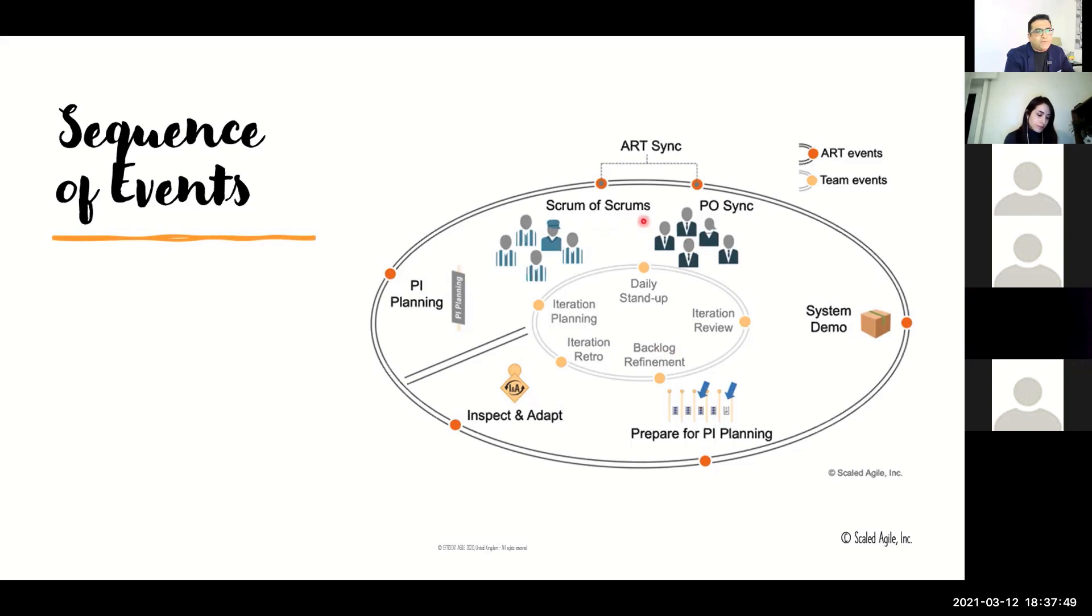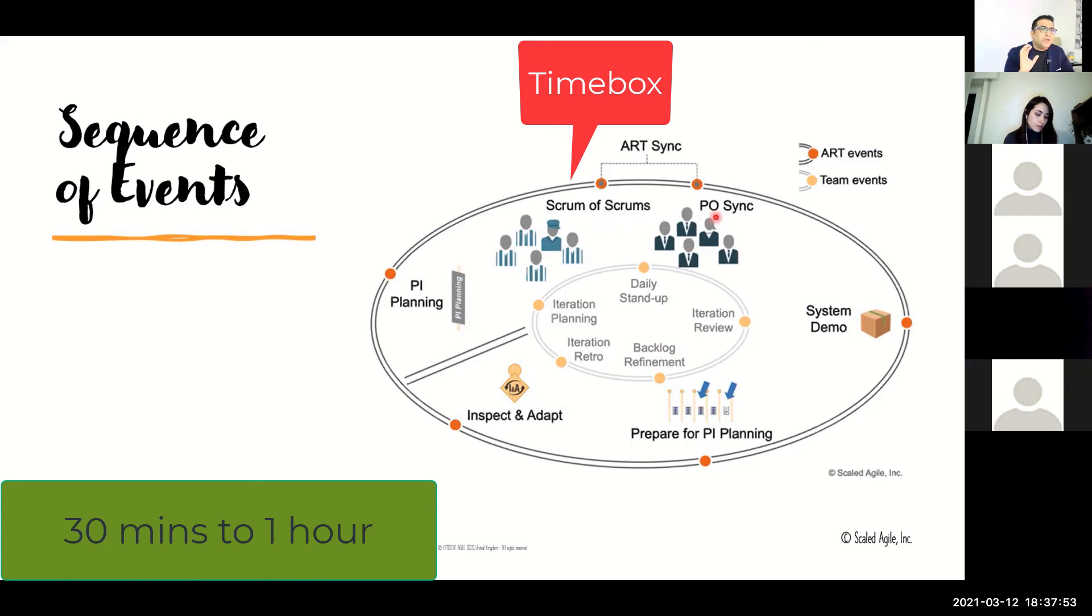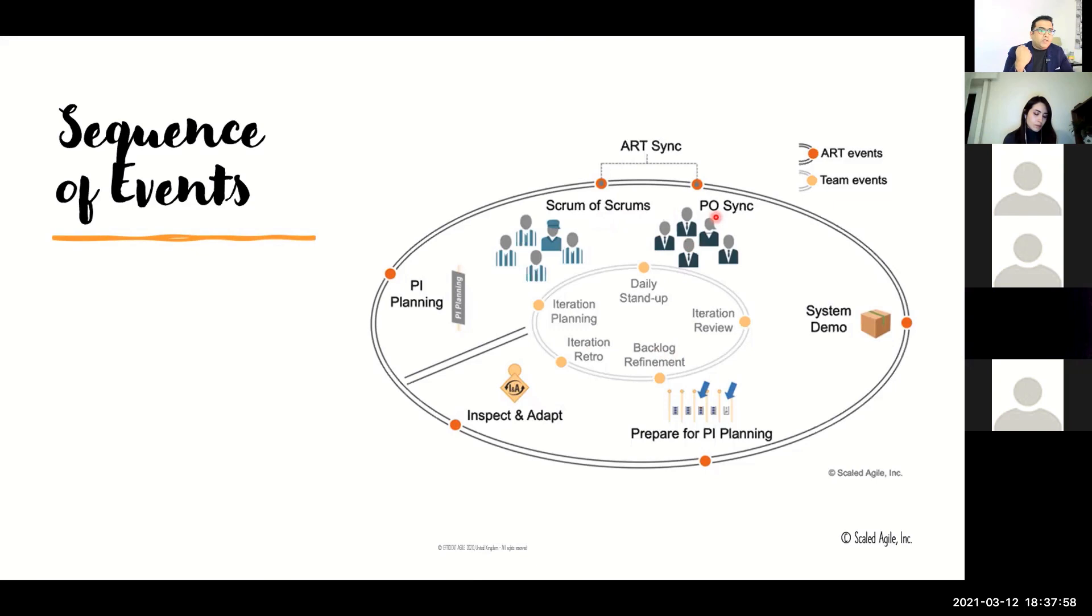There's a time box for scrum of scrums and PO sync. It could last between thirty to sixty minutes. You could do it daily, or if you want to do it two or three times a week, you could invest about thirty minutes for each of the events.